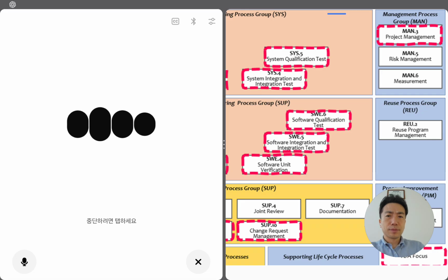It's like saying, as of this date, this is our approved plan. After that, any change must go through a change control process, not silent edits. So if your project plan was baselined on October 10th, that exact version is what auditors or teammates should compare new updates against. Does that idea of a frozen reference point make sense?